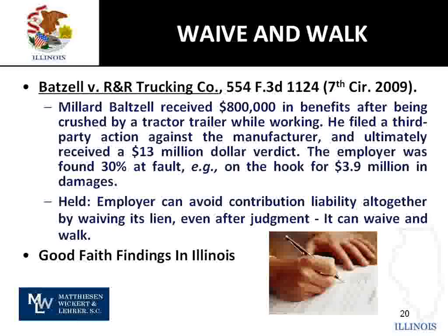I want to go back a couple of slides, but I'm not going to bring them up, to the Kentucky issue, where the construction contract is going to dictate whether there is a Kentucky waiver. And in Illinois, interestingly, those types of indemnification provisions in construction cases are actually invalid based on the Anti-Indemnity Act. However, notwithstanding that it's void as against public policy, we're not going to allow people to insure others for their own negligence, the courts will still allow a fiction of sorts and allow that to be a Kotecki waiver. So it's a void provision, but it's allowed in this circumstance to operate as a waiver of the Kotecki